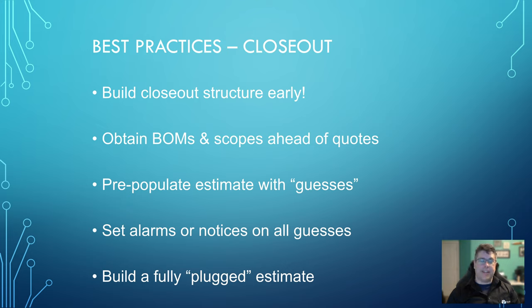The other one that I always loved was explosion-proof water heaters. I did one project where the engineer spec'd out a wild explosion-proof hot water heater for underneath a sink, and it came in at $25,000. If he had moved it 8 inches to the other side of the wall, so no longer in the explosion area, that thing would have been an $800 unit. So just things to watch out for and keep an eye on.